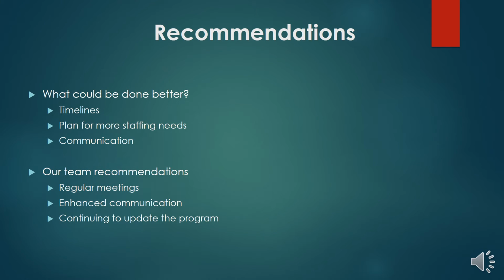One thing that could be done better would be adhering to timelines. Business analysts greatly underestimated the complexity of some of the requirements, which led to late delivery times. For future projects, Sovos needs to have better analysis of the requirements so they can accurately staff up the resources required to build the individual applications. One reason that this could have been an issue was due to lack of communication.